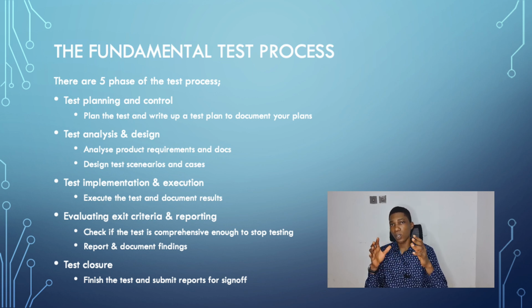So once you've executed all the test cases, you can submit the result to the developer, who is going to take a list of all the failed test cases. The failed test cases can be recorded into another sheet or somewhere else called the defect tracker. That defect tracker lists all the defects that have been discovered, all the test cases that failed, and defects that have been discovered during the test. And the developer is going to look at that defect tracker and try to fix those defects.